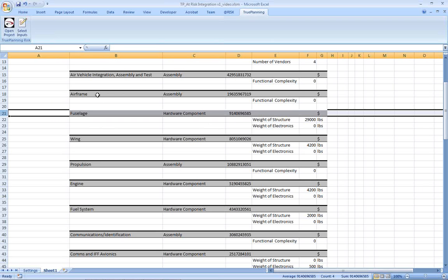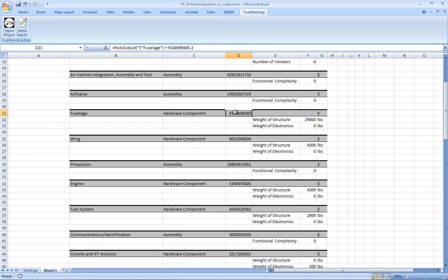So if you want to use an input variable, you have to make sure its parent cost object, the owning cost object row, is there. If you're not going to use any of it, feel free to delete all of it, or you could just go in and delete the contents of the cells, or even just remove the function part. You could leave the value; it just wouldn't change, or at least it would change, but the at-risk wouldn't deal with it. So those are a couple of options for manipulating the set of variables you're going to use.